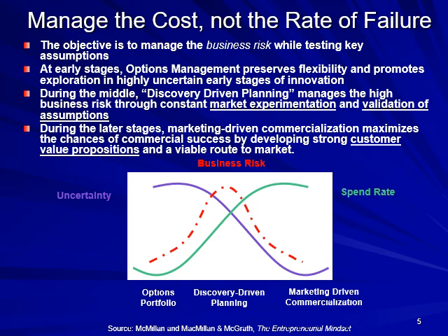So what this is trying to do is track how expenses and risks change over time. As the arrow moves towards the right, time is increasing, right? In the beginning, where time is zero right here, we barely started with the project, so we are in the ideation stage, right? And at this step, we have barely spent any money. You can see that spend rate, which is right here, it's pretty low. That green curve is close to the axis where the zero is, right? So we haven't spent a lot of money, we're just coming up with ideas.